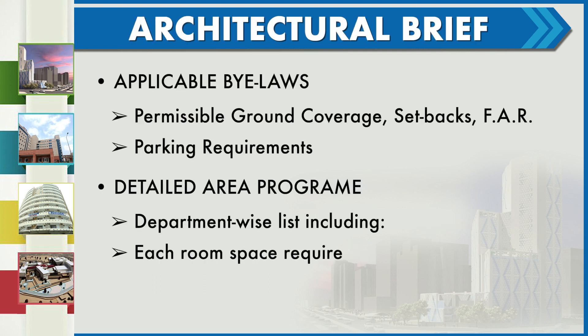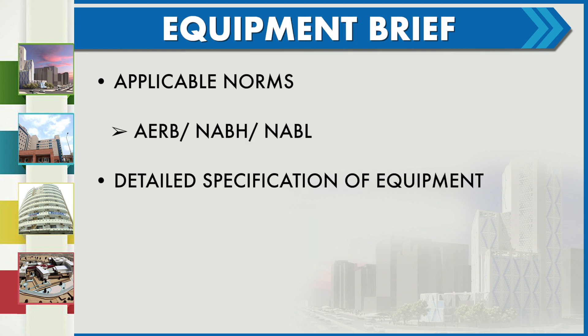The architectural brief will include applicable local bylaws for the particular project — for example, permissible ground coverage, FAR, setbacks, and parking requirements. The architectural brief will also include a detailed area program which lists departments, each room and space requirement, and their functional descriptions.